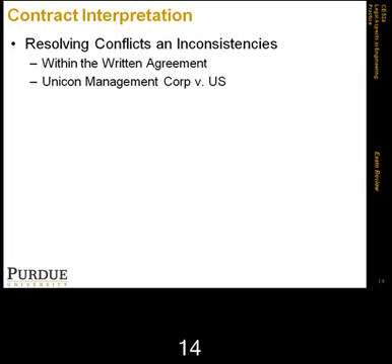So the court did point to the view that the contractor should have been aware of the possible contradiction. So again, the plaintiff in this case was found not to be entitled to recover, because this was what we call a patent ambiguity, and the contractor had a duty to inquire. There was another case that followed that we looked at, that took a different view on the issue of precedence of documents and the duty to inquire in cases of patent ambiguities. That was the case of Hensel Phelps versus the United States.